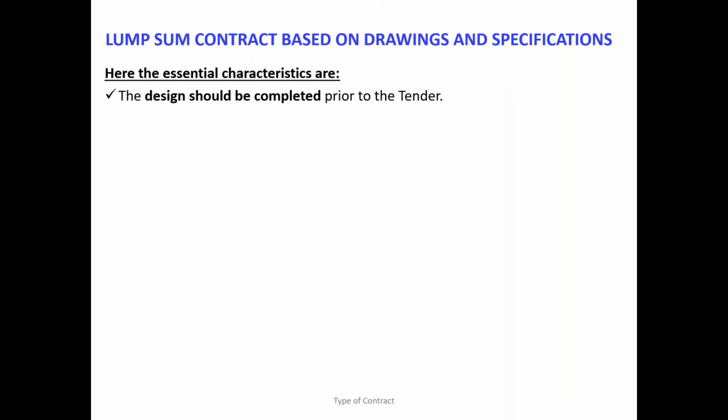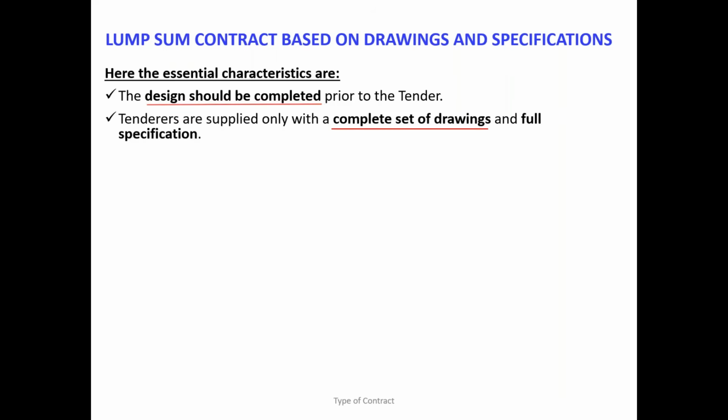You have to give the complete scope of work. That means you have to give the design, drawings, specifications, pricing preamble, everything, very clearly. Then the contractor takes those complete drawings and specifications and whatever other contract documents, and they will give the price only. Look, you give the drawings, specification, everything. This is the job I need to get done, and the contractor gives the pricing. Do you understand what I'm talking about here?